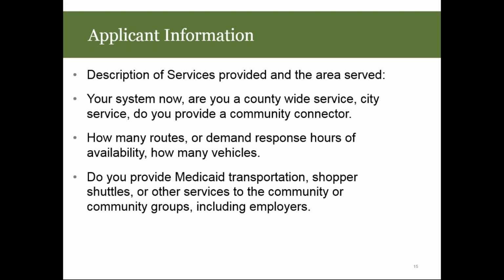But with our Clemson area, we have to have the long range buses that can go 20 hours a day, 7 days a week. And that's going to require a different type of bus. We can't use the quick charges. We have to have the long range. So that's getting ready to hit the streets in August or September of this year. That'll be a little over half of our fleet electric then.